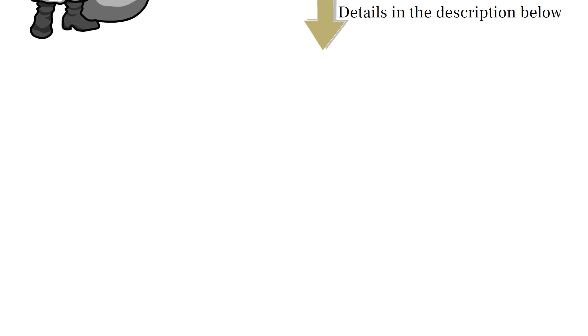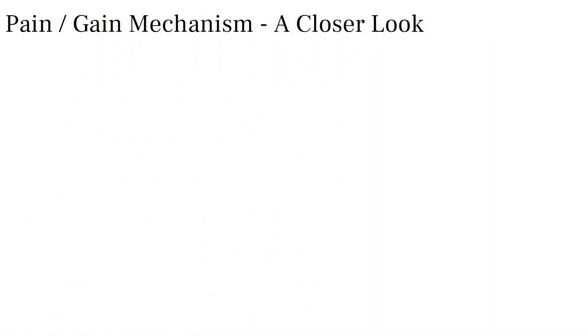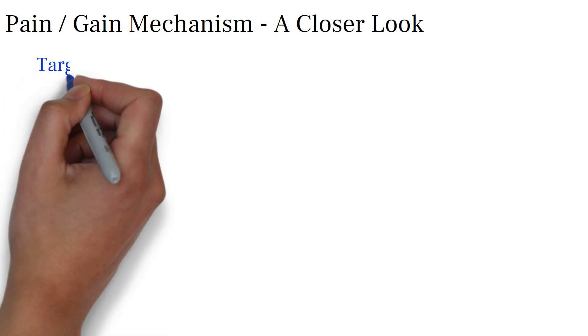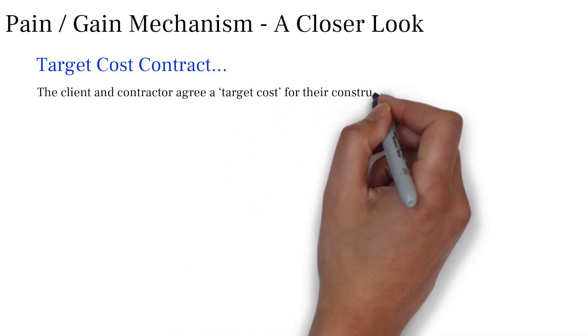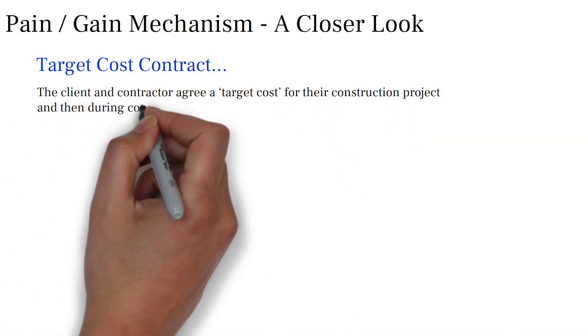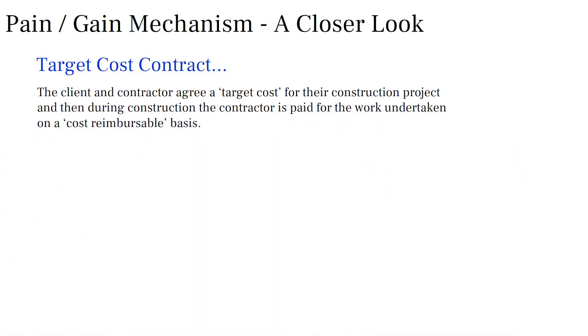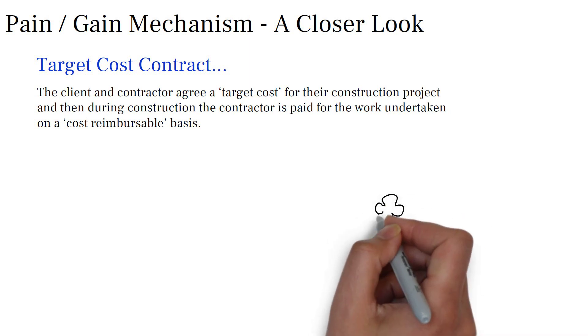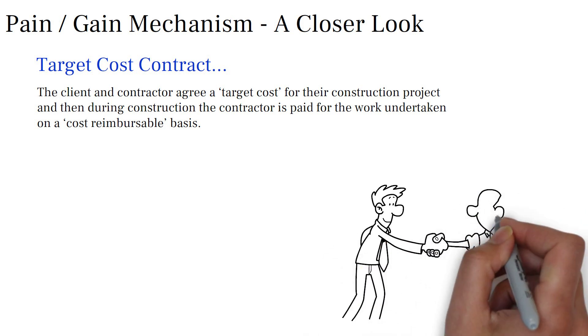We have covered target cost contracts in previous videos, but here we want to take a closer look at the pain gain mechanism and how it works. Before we do this, it is worth reminding ourselves what a target cost contract is. The basic premise is that the client and contractor agree a target cost for their construction project, and then during construction the contractor is paid for the work undertaken on a cost-reimbursable basis. These payments are assessed by looking at the contractor's records and accounts, generally on an open-book basis where the employer can inspect the actual costs incurred by the contractor to complete the works.